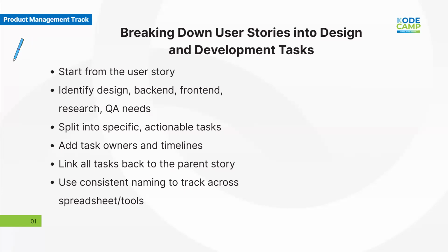Step one, look at it from all angles, right? Not just from the development angle or from the design angle. This story needs more than just code to function. You need UI design for the transaction history screen. Maybe you need research if you want to understand how users think about tracking their expenses. And then you need backend to fetch transactions from a database.